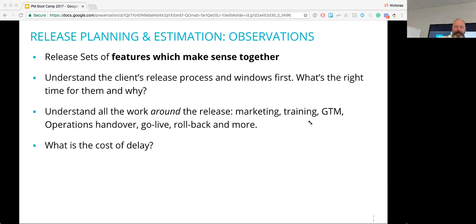Yeah, I'm with Eric. It sounds like the product planning process maybe isn't the best it could be. And I actually do have some ideas about this that I could talk about with you offline, but I think it's about quantifying. It's exactly what you're saying. Okay, well, we have released this thing, but the feature's not toggled on. How can we quantify the cost of not doing it now? And I think you should draw that back to the benefits that were advised in the business plan of when the realization is going to happen. So if you can't realize that benefit now, then it's going to cost, and then you can figure out what the actual cost of it is.